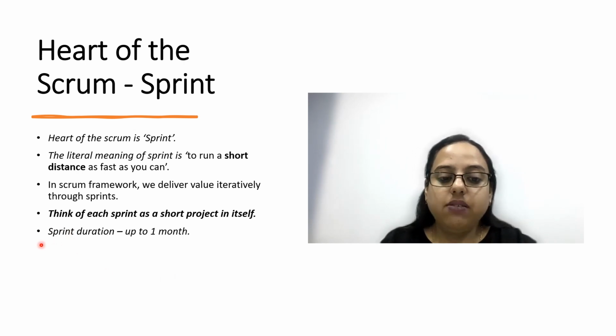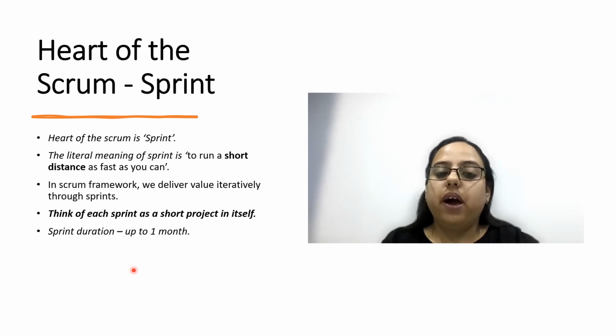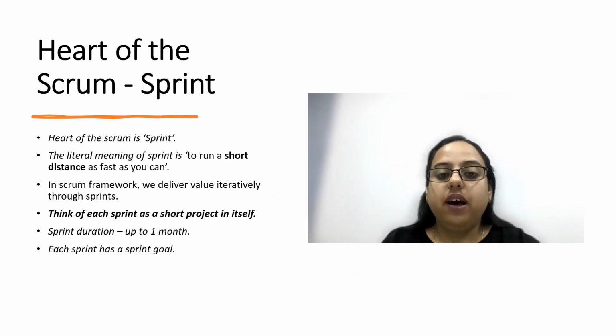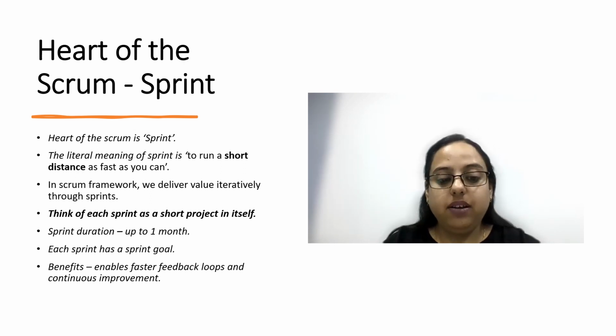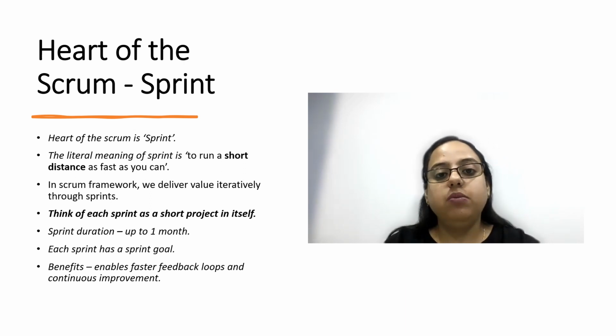So this sprint is like a short project. It will have its goal, and the entire team will be working towards that sprint goal. At the end of the sprint you will deliver something, demonstrate that to the client, get the feedback, and then start another sprint. So we are running a short distance as fast as we can. And as I said, each sprint has a sprint goal. The benefit of keeping a sprint is that it enables faster feedback loops and helps in continuous improvement.